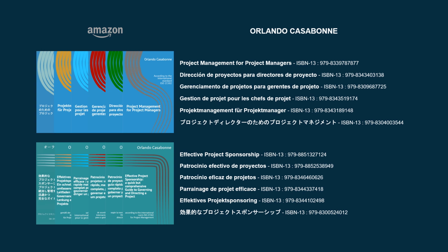You're right, there's more to it. For bigger, more complex projects, you might want to go deeper with quantitative risk analysis. This involves putting actual numbers on the probability and impact of each risk. So we're talking about getting into the nitty-gritty details here. It sounds a bit like using a magnifying glass to look at a grain of sand. Sometimes you need that level of detail, sometimes you don't. Exactly. It depends on the project.